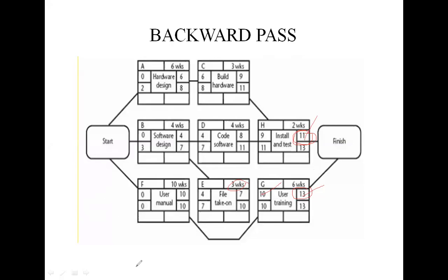Then the latest completion date for activities C and D is the latest date at which activity H must start.